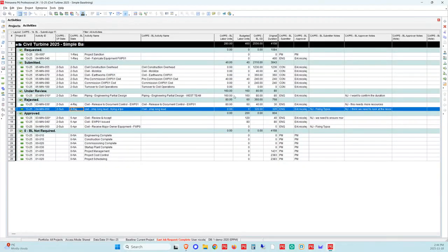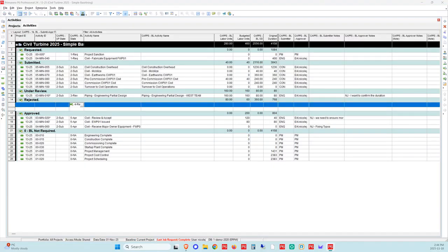I can see the labor unit changes between what was in the system and then what they've input, and the duration changes as well. So I can see those modifications, and if I need to, I can overwrite. That's the important thing here. Okay, so the scheduler always has the ability to do an overwrite on anything that's been put in. All right, so they're in charge ultimately. And okay, so that is how the baselining will work.